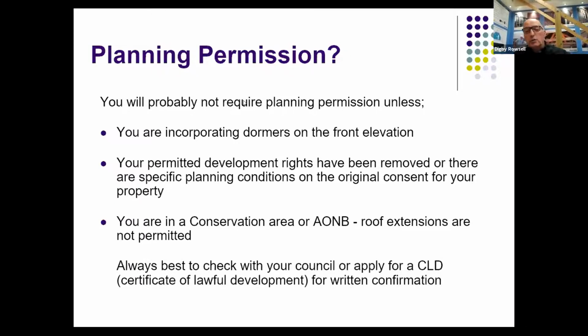It's always best to check with your council, or better still, apply for what's called a CLD, which is a certificate of lawful development. And then you'll get a written confirmation that the work you intended doing does not require consent. But there is a huge amount of work you can do without planning consent for dormers.